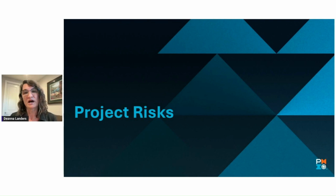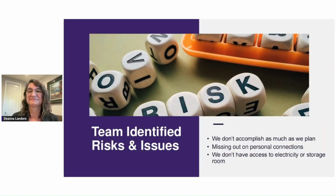But one of the things that we talked about, and we had the meeting biweekly and then eventually weekly before their big trip, was, of course, status, but also risk. And we identified the risks that they knew about from prior trips and issues that they knew that they would come across. And so we reviewed these in these meetings. We also added some formality to their approach. So together we identified risks and responses so that they would be prepared and in some cases could avoid entirely the negative impacts. So I heard a lot of stories from these prior missions that helped us identify these risks.